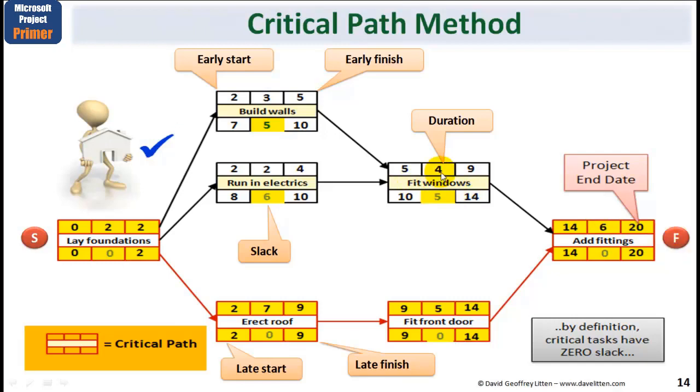Put another way, it could take still 4 days in duration and start at the latest on day 10, or it could take 4 plus 5, 9 days duration, and still the project would come in on time. So why is this helpful?